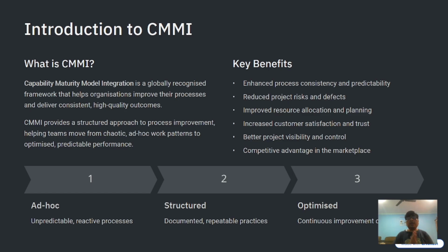for any project, we start with a kickoff meeting. In the kickoff meeting, multiple stakeholders get involved, and we analyze that particular project for risks. We identify the risks, and then we plan for the mitigation of those risks. We are not waiting for the risks to occur.